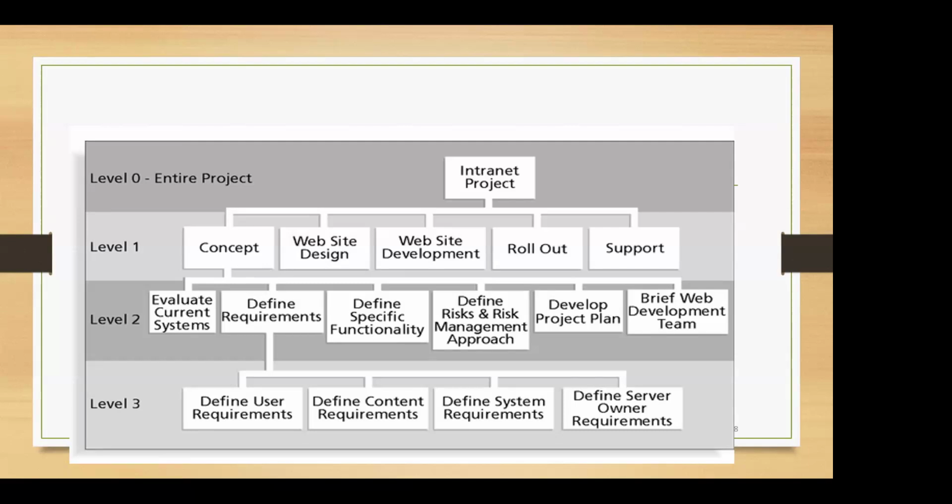So that is going to be very difficult to manage. But if we have a few levels, like 4 to 5 levels, maybe that would be much more manageable. But if you have only 1 or 2 levels, then it is a sign that our project has not been significantly decomposed. You have to decompose the work much further, right? So you have to make sure that you have the appropriate number of levels, that you have broken down the project into the required level.